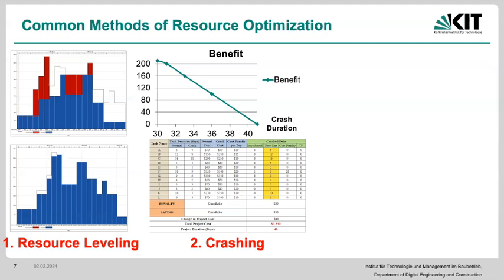So every time we can crash certain activities, and by means of that, if we can reduce the duration by 1 day or 1 unit, we would get some savings there. The savings could be operation or production costs, or could be just simple overhead as well, right? So all of these can actually be calculated.